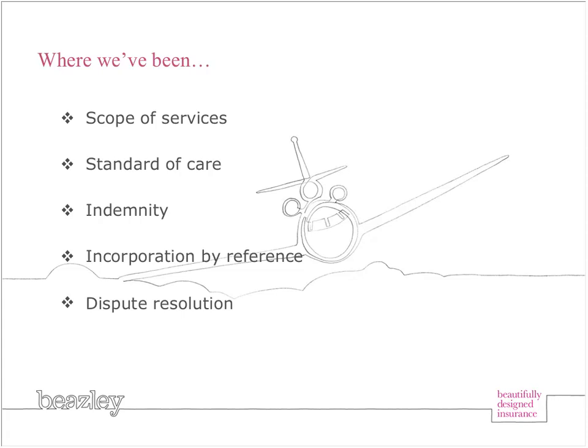You want to avoid what I call unlimited or absolute scope. So if you see words like you'll provide all services or complete services or each and every or all necessary, all those types of words really expand what your scope can be. And if there's a disagreement about something that the client thinks you should be providing, and you say, well, we never thought we were going to provide that, and they said, well, look, right here in the contract it says that you are going to provide each and every service necessary for the complete and fully operational project. Well, that's a pretty good argument that your scope is probably more expansive than you originally intended.